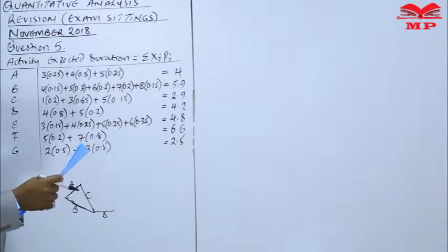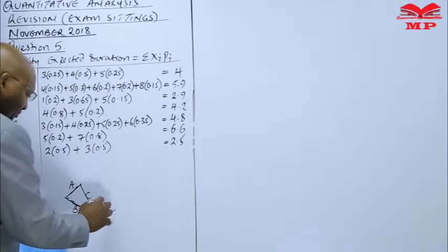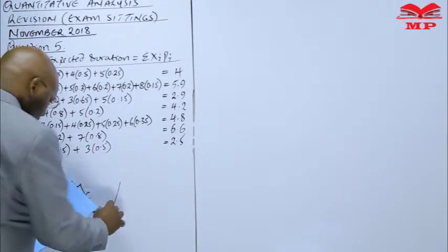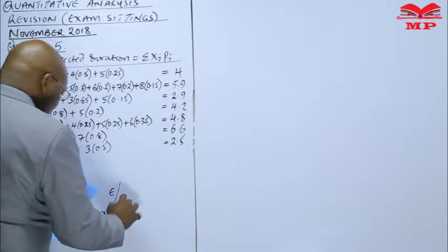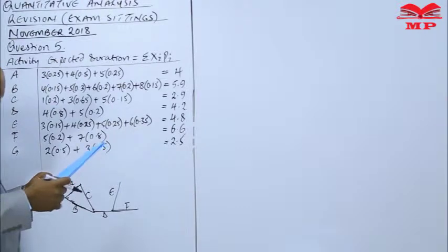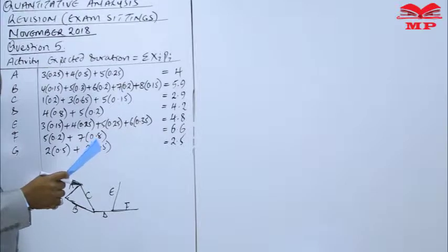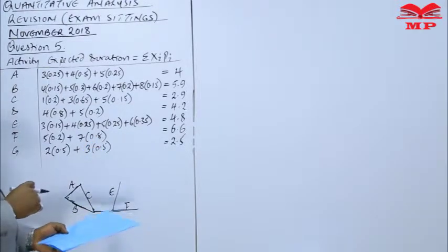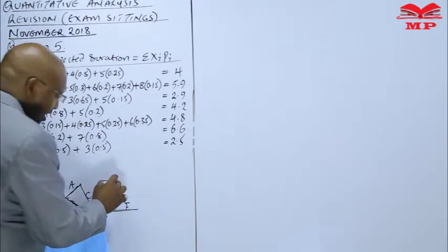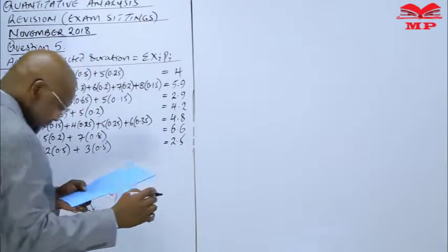Activity E coming from D. Activity F coming from D. So this is activity E and activity F. They are all coming from D. Then G coming from the two combined. There is no way these two can come from the same source. So automatically we are going to have some dummy to give us activity G.